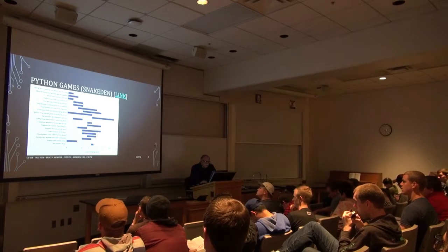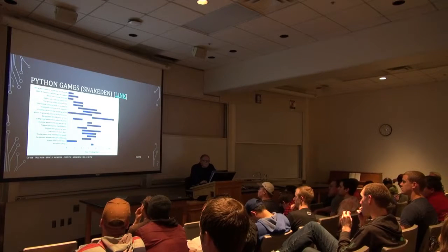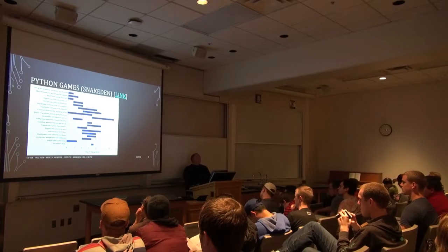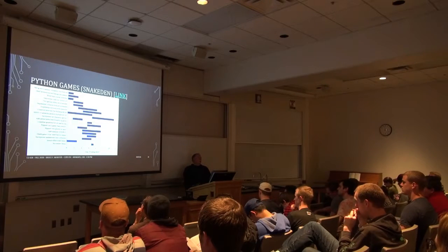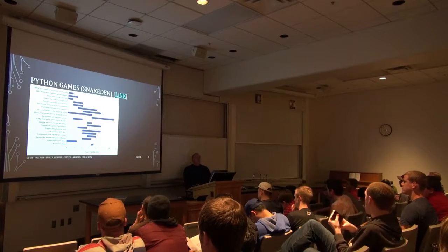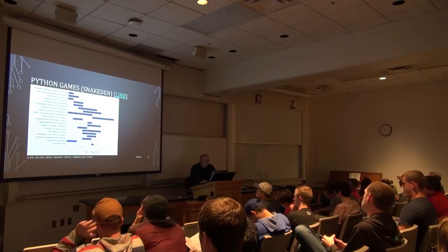And this is a little sparse as a Gantt chart, just because usually a Gantt chart is tied to actual calendar days, and this simply says working days. But for the sake of this project, given how short it is, I'm not particularly bothered by that. But in the real world, if you're doing a Gantt chart, typically they will want calendar days or weeks somewhere so they can compare it against the actual scheduled date.